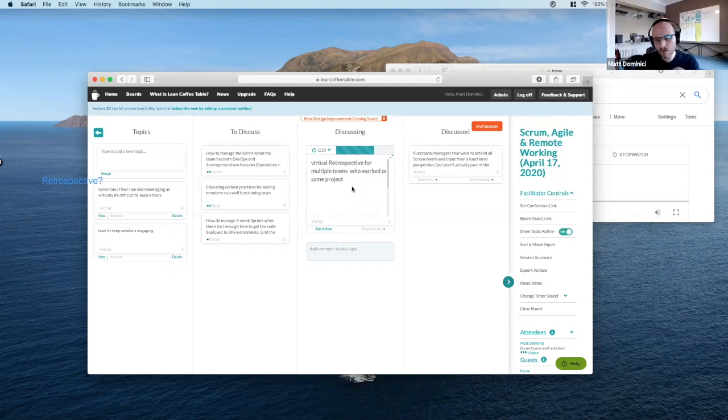Right. So one thing you can do if you're using Zoom or any of the tools is have people write what they're thinking at the same time in the chat window or whatever tool you're using, but have them hold off on actually pressing the enter button. So have them type everything up. Nobody can see what anyone else has written yet. And then at the end you say, okay, 3, 2, 1, everybody press enter. And that gives them time to think and write things down without actually talking about it.